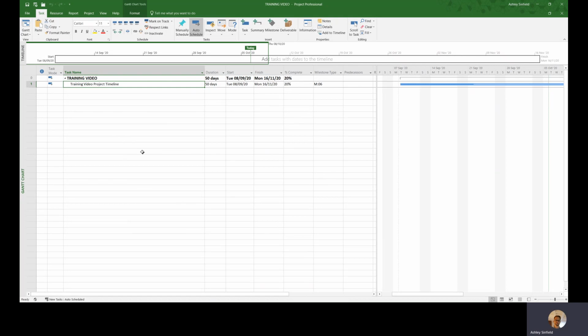This then produces an overall percentage complete for your project. In this instance, as we only have one task line, my overall completion is 20%. This is important to include, as this does feed into reporting and will show in your highlight report, but also your board report.